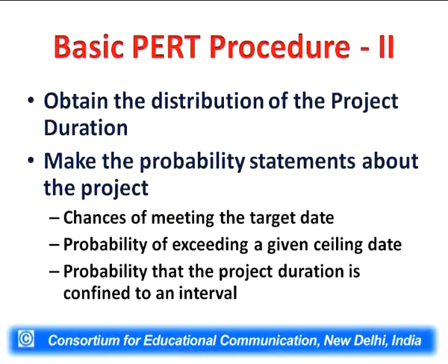We can also calculate the probability of exceeding a given ceiling date, and the probability that the project duration is confined to an interval. Within these particular days we shall be able to complete the project, and we can calculate the probability of that using the standardized normal distribution and z tables.